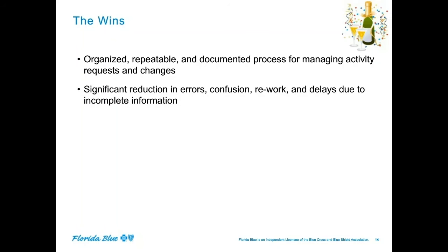Significant reduction in errors. I can't stress how much this helped. And errors, confusion, rework, and delays due to incomplete information. Because it used to take us sometimes 2 or 3 days to schedule a class because the requester would go on leave the next day and wouldn't be back until 2 or 3 days later. So we would have to wait until they got back to ask them a couple of questions, and we have to try to find their boss, and they don't necessarily know what the particulars of the class are.